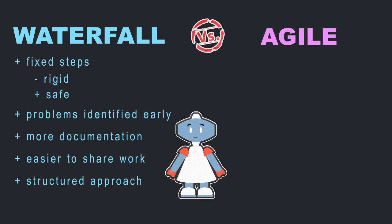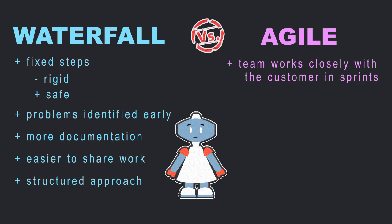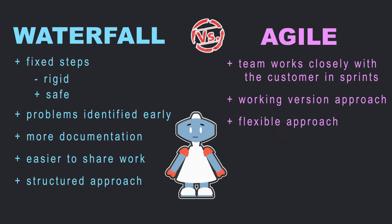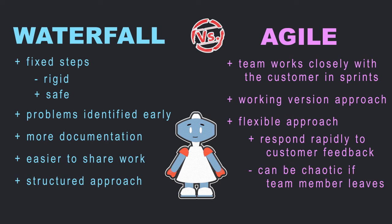In agile, the team works closely with the customer throughout the sprints by using a working version approach. While this flexible approach allows the team to respond rapidly to customer feedback, it can be chaotic if a team member leaves before the project is finished.